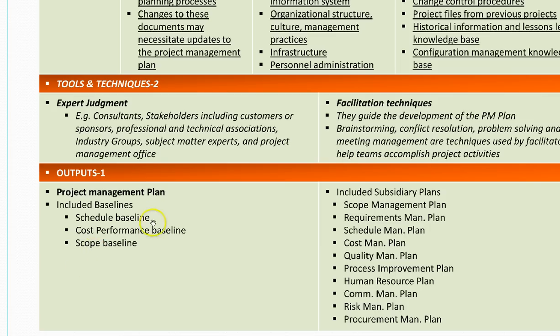Any change with respect to this would change the deadline, the ending of the project, and the cost of the project, and it might end up in project failure. So it is important. You should know the baselines are the schedule baseline, cost performance baseline, and scope baseline.